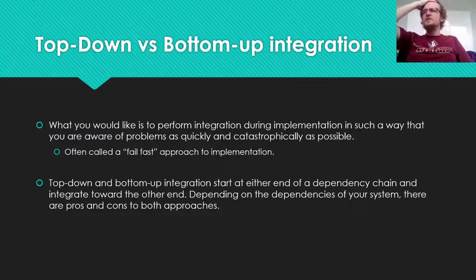So what you want is you want to be able to perform integration testing throughout the life cycle of the development. And in doing the integration testing, what you're actually doing is performing integration of the systems, and then as soon as tests fail, you're able to react, and you don't end up with a situation where you're trying to integrate everything at one time and then fix all of the issues at one time. So this can kind of pile up toward the end of a project.